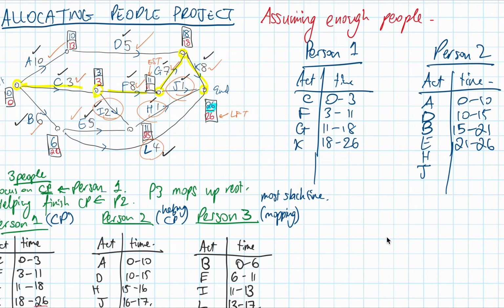So if we want to allocate our resources as best as we can, and people can't share jobs, it stands to reason that we should assign person 1 or person 2 to one doing L and the other doing J, H, and I. So I'm going to make person 1 just do L. Okay, so I'm going to change that to green. Now L brings that from 26 to 30, like that. And now we've done job L.